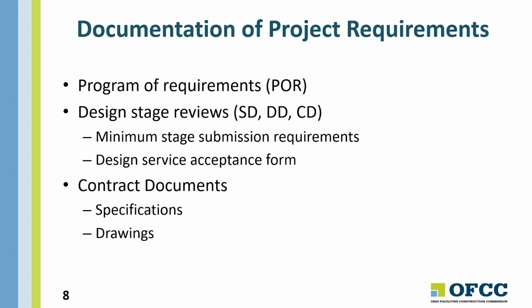So it's very important to document the project requirements. And if you are going for LEED, there's another step to that. But we start with a program of requirements, or a POR. And what this does is it breaks down the building into the spaces that are necessary, classroom sizes, conference room sizes, how many people are going to occupy each of those spaces, what services need to be brought to those spaces, electrical outlets, if there are special outlets.